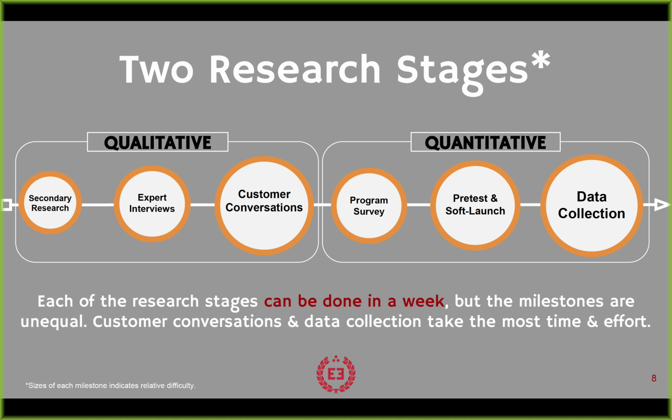But each of these 2 stages in the Gantt that I'm going to show you here shortly that lays out this overall Agile customer research process, this is 1 week for each of these things. Now the data collection can spill over a few more days into the analysis. There's analytical stuff you can start to prep for while data collection is happening. But really, half of your sprint should be this, the actual field work, going out and getting information. The other two parts of the sprints are going to be the analysis and the reporting.